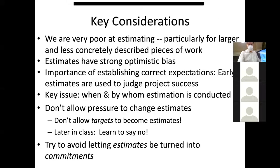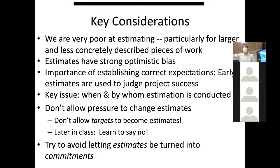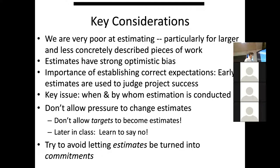These are real human stories involving a lot of smart people working long hours with advanced technologies. Estimates have a strong optimistic bias. The problem is that optimism hurts us because these estimates are used to judge project success. As McConnell put it: if we underestimate, our project may be judged unfavorably. If we overestimate and deliver early, clients generally won't be mad. But if we're over-optimistic and underestimate, people can be very unhappy — same product, much less satisfaction.